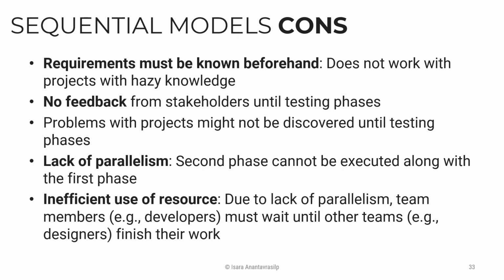So the way the big companies, and only big companies, can solve this is that, for example, at this step, the system analysts interview the customer, the dev team is free. You can allocate the development team to do some other project first. And once the SA finish their work, the design is done, requirement is done, the developers can just come to this project and work based on the set of requirements and design, and the SA can be moved to other